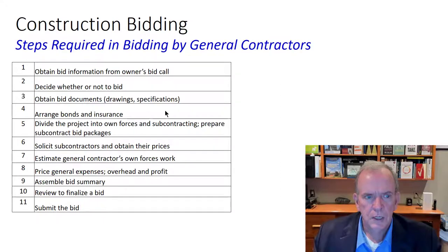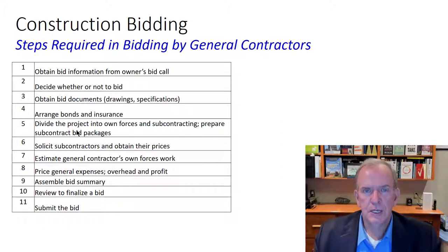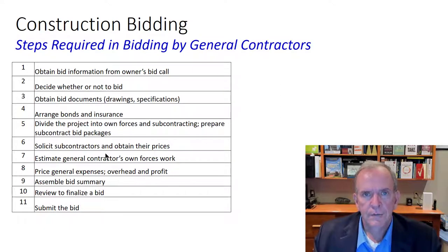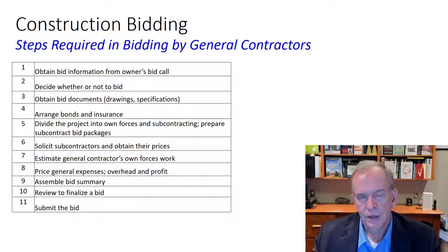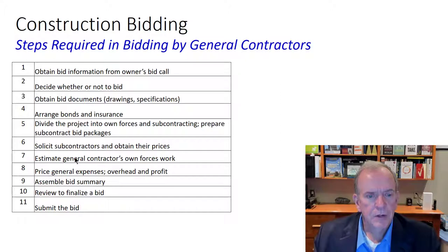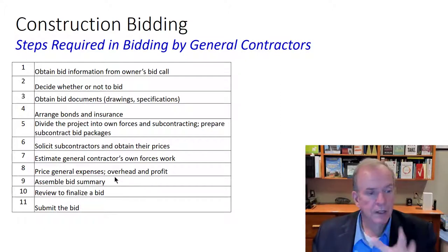You obtain the bid documents — fairly easy these days with electronic formats. You arrange bonds and insurance, divide the project into own forces versus what you'll sub out, prepare subcontract bid packages to get bids from various subcontractors, and then solicit the subs and obtain their prices. You'll find that subcontractors like to give you their price at the very end, very close to when the bid is due, because they don't want you bid shopping — comparing their price with others to lower someone else based on their pricing, which is not ethical.